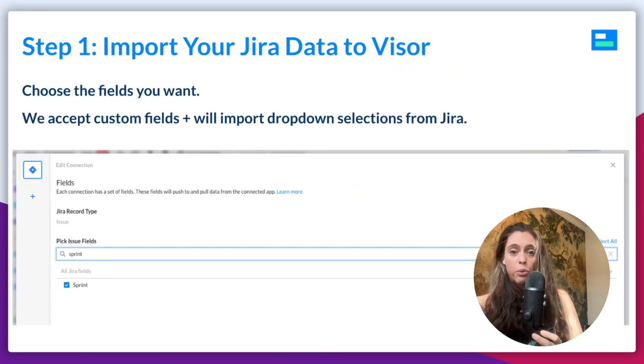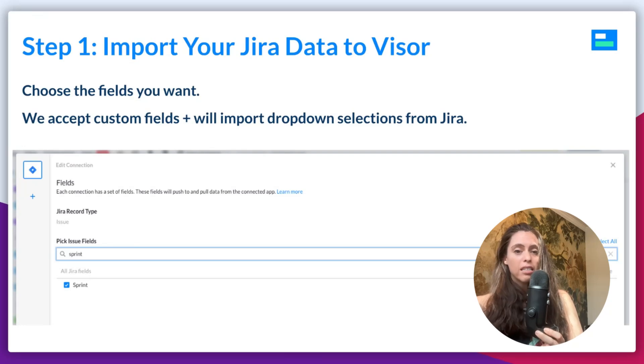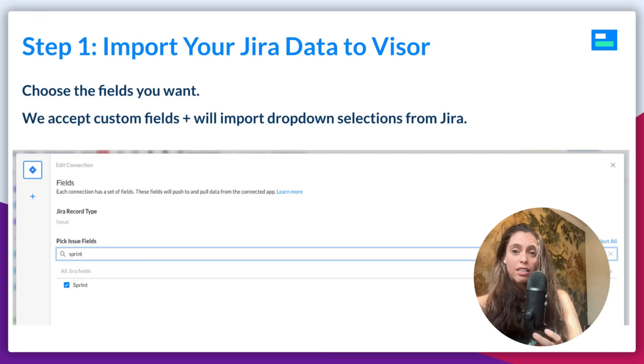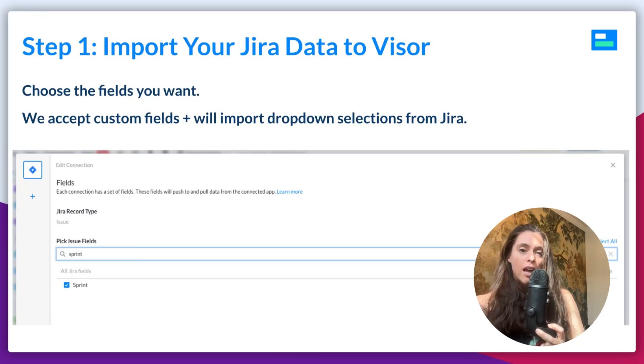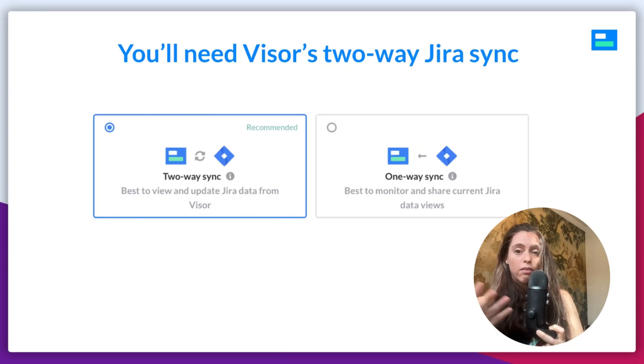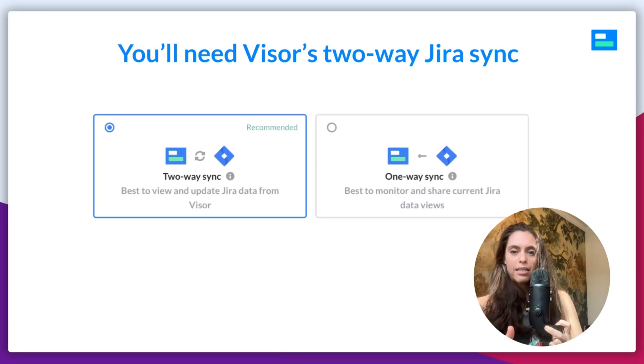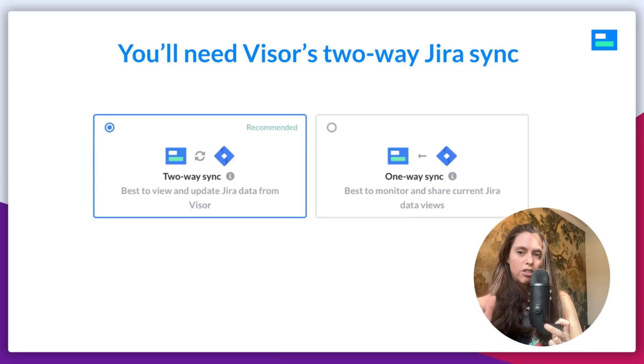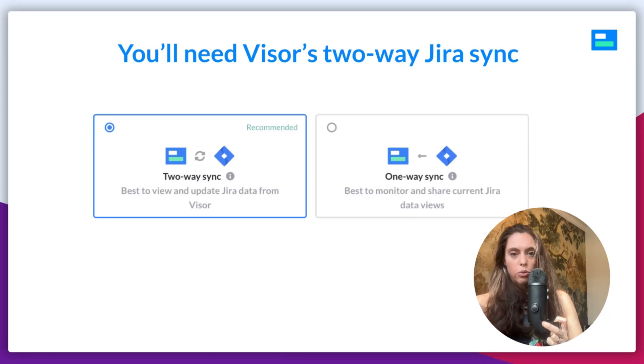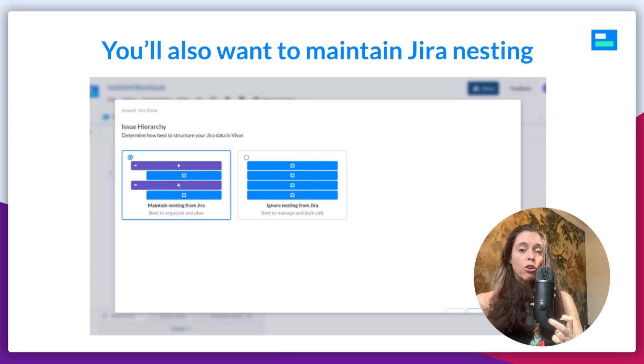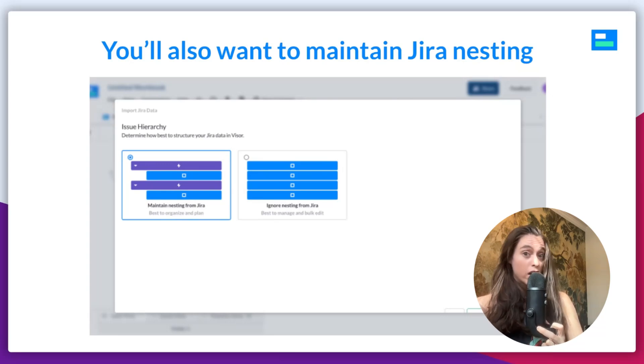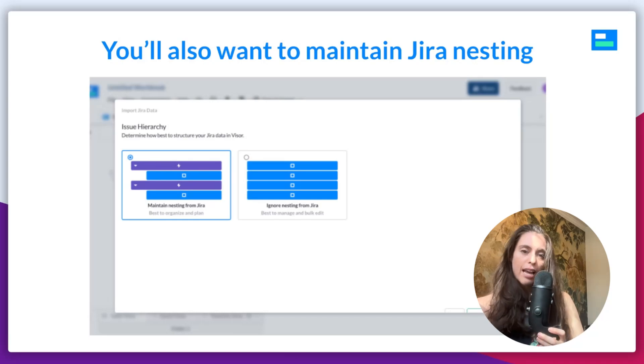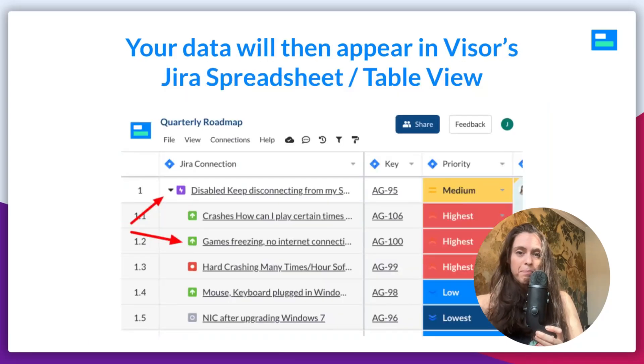So, first of all, you import your JIRA data, you choose the fields you want. We accept custom JIRA fields and you can even import the drop-down selections that you have in JIRA, which is awesome. Then, while you're importing, you'll need to choose either Visor's two-way sync or you could even just do the one-way sync. The two-way sync allows you to also push out changes to JIRA. In this case, because you're importing JIRA data, the one-way sync could also work. But you'll definitely need to maintain JIRA nesting. Visor honors the way your JIRA data is structured and you'll want to ensure that that is intact when you import your data.